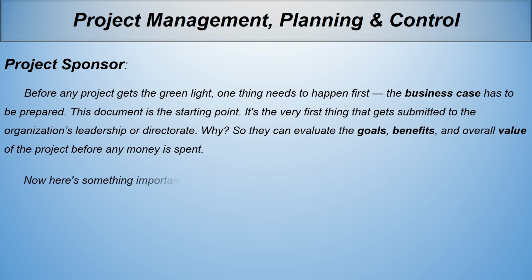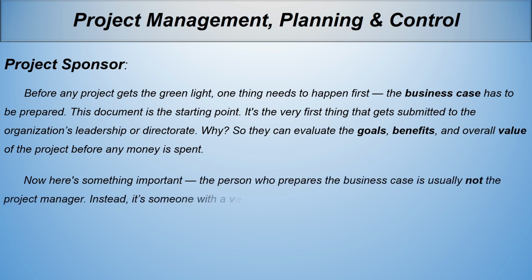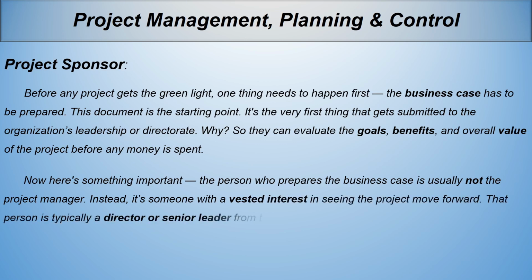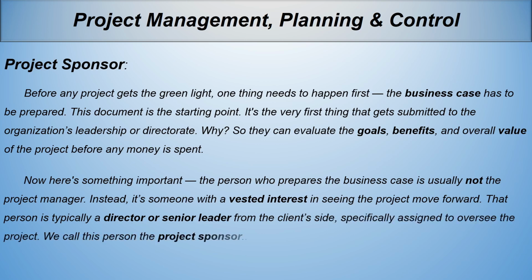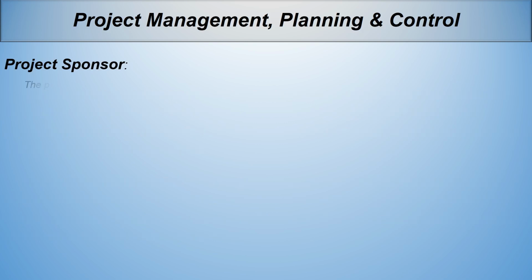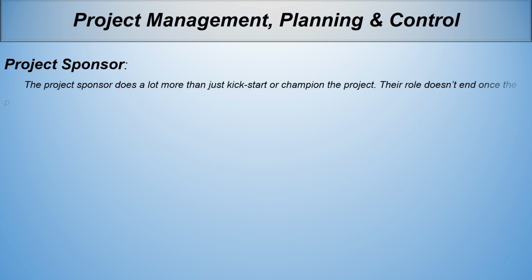Now here's something important. The person who prepares the business case is usually not the project manager. Instead, it's someone with a vested interest in seeing the project move forward. That person is typically a director or senior leader from the client side, specifically assigned to oversee the project. We call this person the project sponsor. The project sponsor does a lot more than just kickstart or champion the project. Their role doesn't end once the project begins. In fact, it continues throughout.